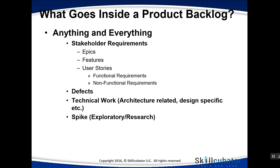The majority of product backlog items will consist of stories, whether functional or non-functional. In addition to stories, the backlog will also have defects — when the team is building an application, defects will be raised and sit in the backlog. There is also a lot of technical work that needs to be done, known as enablers. This work may not be directly related to the user but will help them use the system, and can include architecture-related or design-specific work.